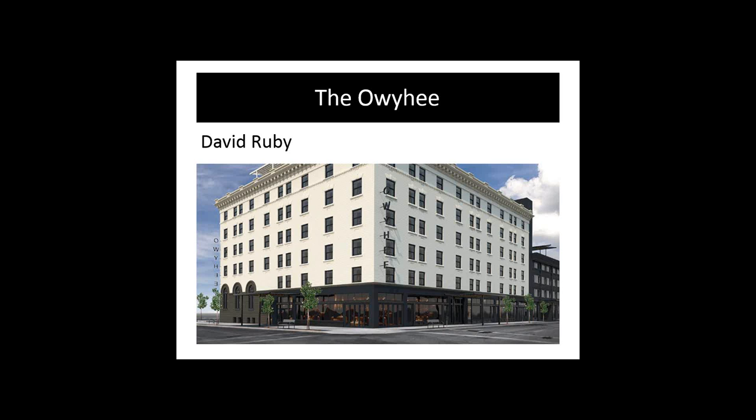So how much value would there have been for you to maybe have a better planning process or a better time frame to have been able to do a full energy model? Oh, immeasurable. And if you were to do it again, what route would you take? Definitely would. From an architect standpoint, we would definitely encourage developers or even people planning to buy a building like this to do a much longer due diligence period to just find out as much as you can about what really is going on.